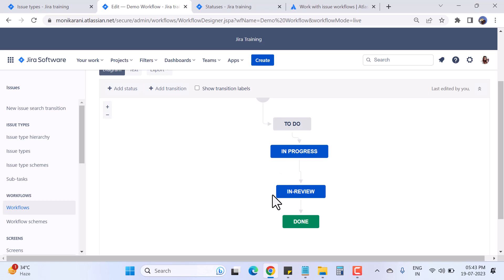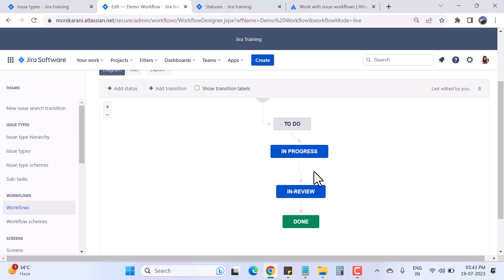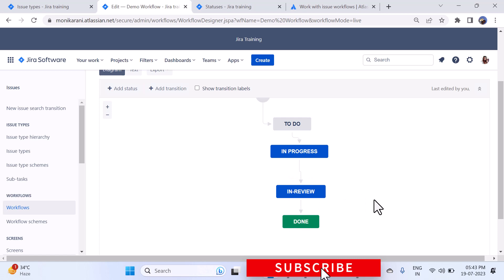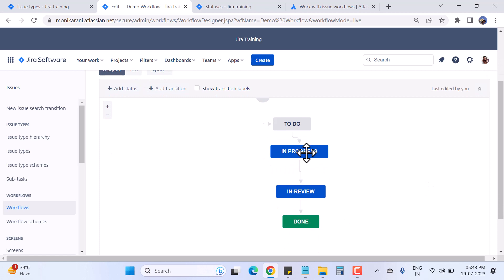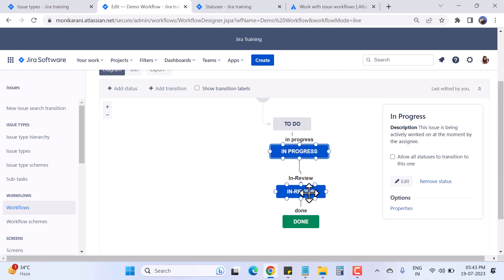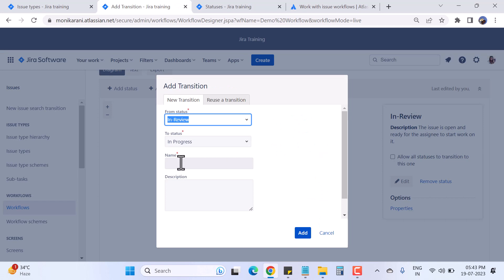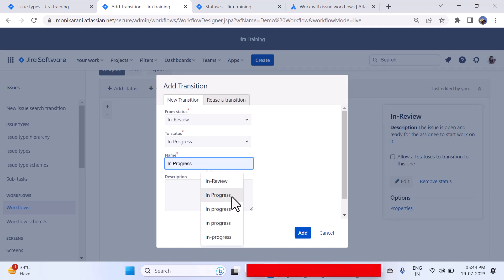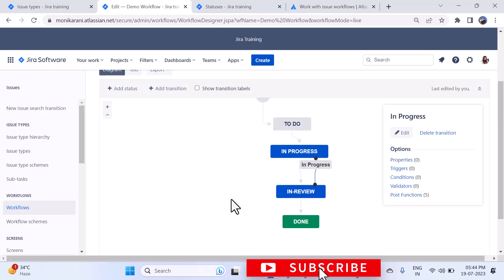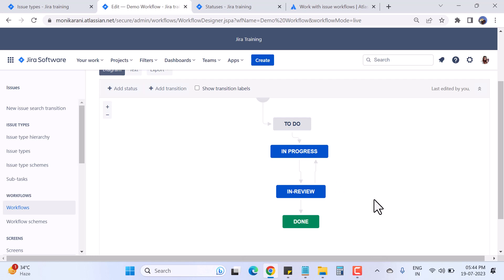So the flow is: To Do → In Progress → In Review → Done. But currently issues cannot move back — you cannot go from In Review back to In Progress, or from Done back to In Review. To solve this, you create a reverse transition, for example from In Review to In Progress, give it a name, and add it. That's how you handle backward transitions in a Jira workflow.